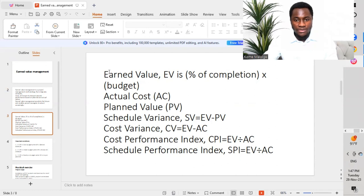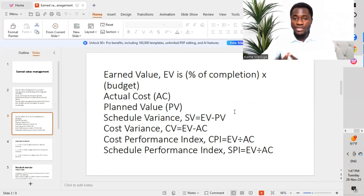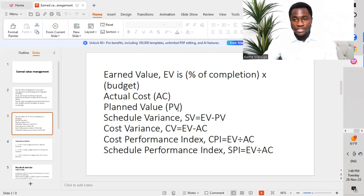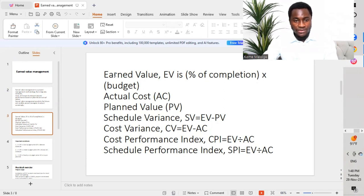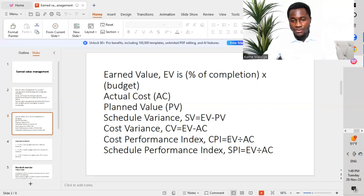We have some key elements to define. We have Earned Value (EV), which is equal to percentage of completion multiplied by the budget of the project. AC is the Actual Cost. Plan Value is PV. Schedule Variance (SV) equals EV minus PV. Cost Variance (CV) equals EV minus AC. Cost Performance Index (CPI) equals EV divided by AC. Schedule Performance Index (SPI) equals EV divided by PV.